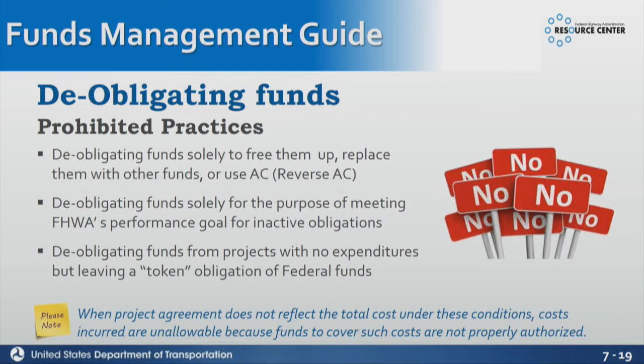Also, we do have some things like ER where you can obligate, maybe you have an ER event and we haven't issued the ER funds yet because it has to go through a whole big, long process to get the funds issued. But you guys need to get the roadways working, right? So you can obligate like STBG funds or NHPP funds if it's on an interstate, and you can expend those funds, and then when you're issued the ER allocation, you can go back out, credit, and pay back all of those expenditures, deobligate the federal aid funds that you have on it, then obligate the ER, and then rebuild those costs. That's really the only time we allow swapping of funds.